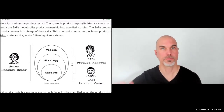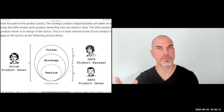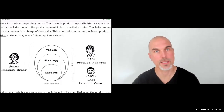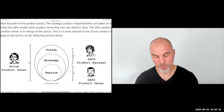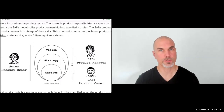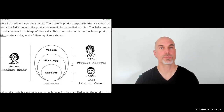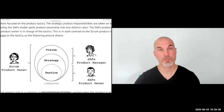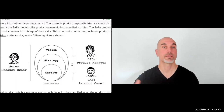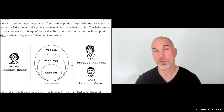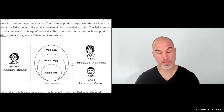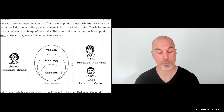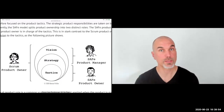There's a business owner with overall responsibility for product success and value creation, then a SAFe product manager and a SAFe product owner. The SAFe product owner is very much a tactical product person who takes charge of part of the product backlog or a team backlog and helps write user stories and interact with the development team. The SAFe product manager takes charge of the strategic aspects — more outward-facing, talking to users and customers, doing competitor research and analysis, and considering overall product performance. So the responsibilities that are unified in one person in Scrum are split across at least two individuals in SAFe.